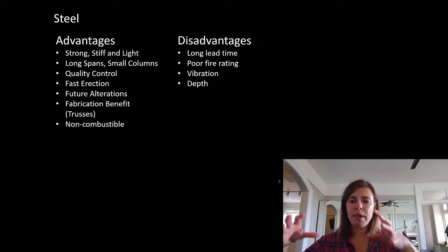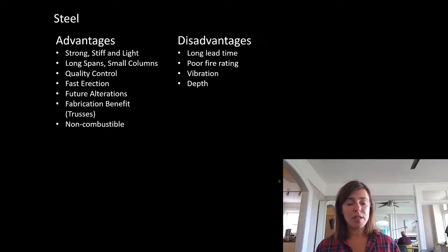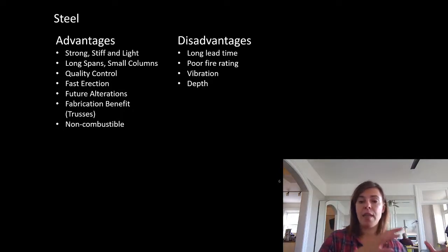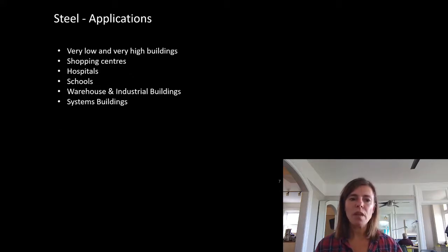So it's not happening live on site. They're creating it off in the shop. The real advantage there is they're inside a building. If it's a blizzard outside, it doesn't matter. Work can still be happening inside the shop. So it's not susceptible to weather the same way, but it gives this appearance that nothing's happening on site. And then eventually it'll all come to site. So we've got a long lead time on that there.